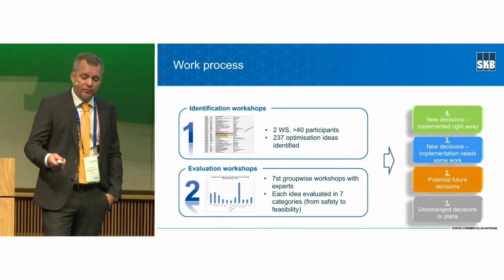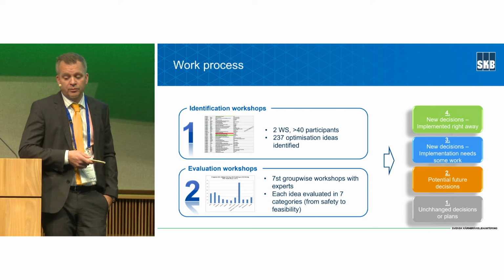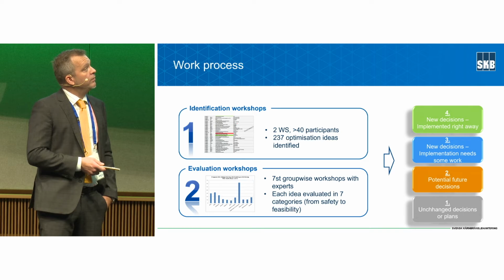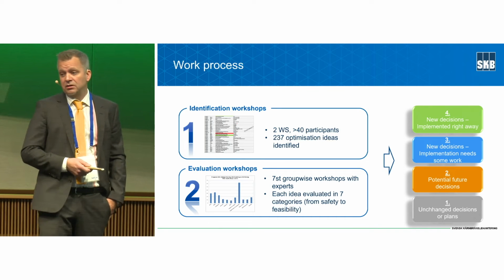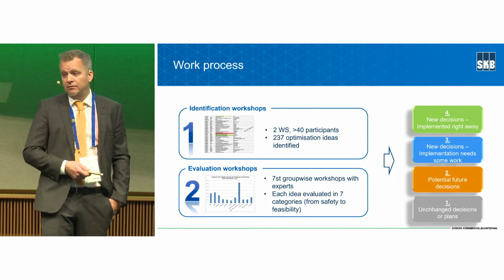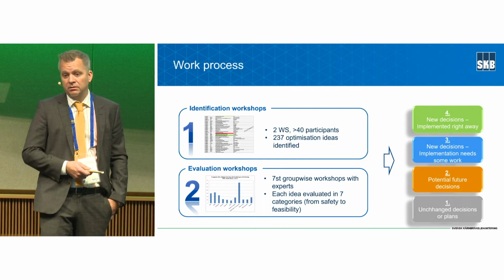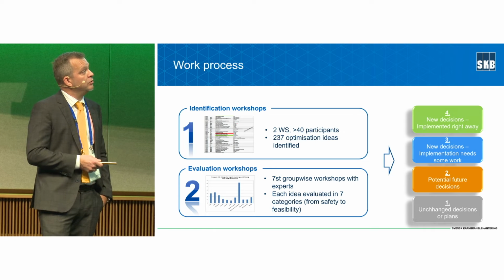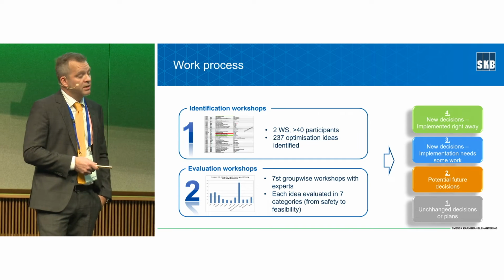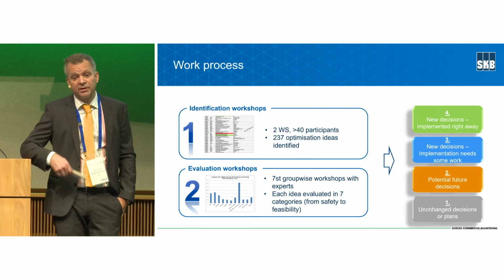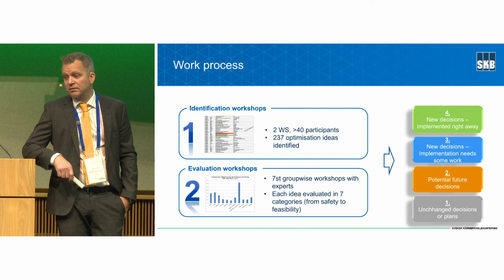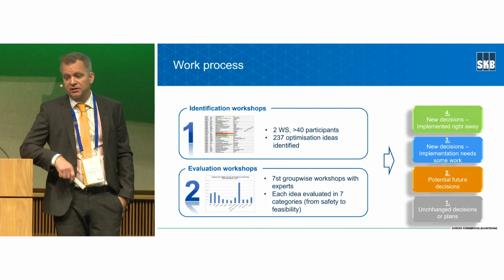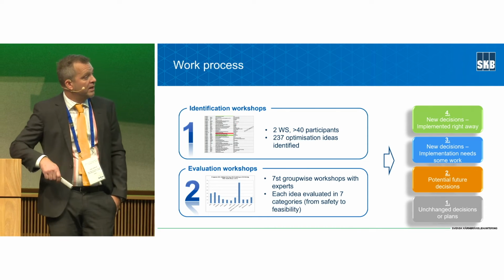And from that second group of workshops, we sorted all ideas into 4 different boxes. The first one is new decisions. Can we take a decision already today? Do we have all the information needed to actually go in another way and take on that kind of solution? The third box is, of course we need new decisions, but do we need some preparatory work, some investigations, just to be sure that it's feasible? And then we also had a box for potential future decisions.